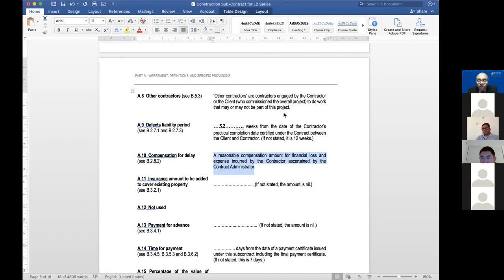It could be a bit more: 1 million plus a bit for the main contractor's time to coordinate and so on. So it could be 1 million and 20,000 or something like that, right? That is the amount that the main contractor should be able to recover from the domestic subcontractor for a delay of 1 day. So per day, so much. Which is why you don't want to put a liquidated damage clause in your subcontract. It's better to leave it as the opposite of liquidated damage, meaning a general damages clause or unliquidated damage clause.